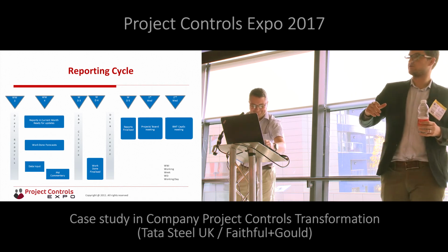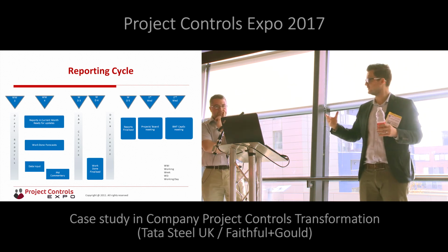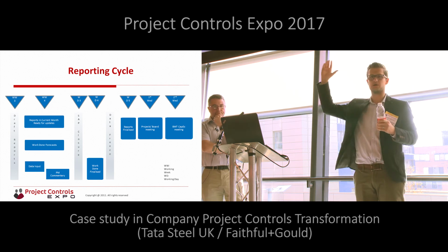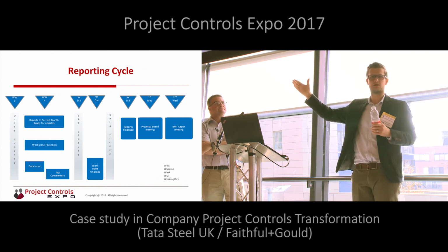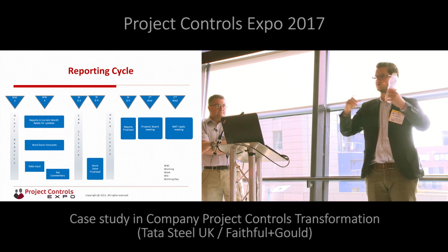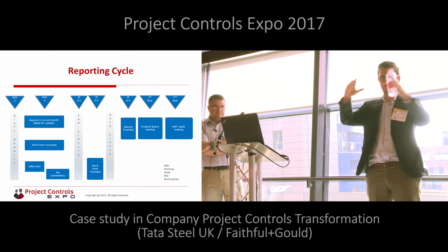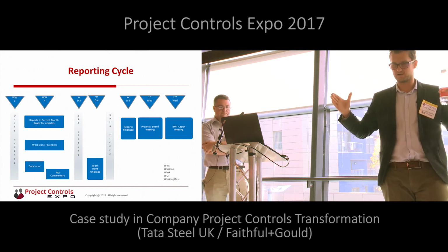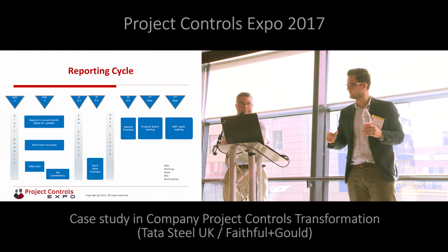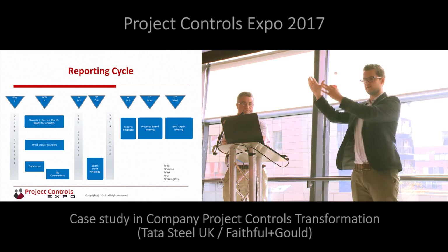Okay, so for me it was all about, if you look at the right-hand side of the screen, what do we want to report and when. We've got some key meetings within our monthly governance. We have a senior management meeting, second Wednesday of the month. Prior to that, we have a project board meeting where we bring all our project managers into one session across one day. We have a 20-30 minute update using a consistent project controls template format. They get 20-30 minutes, 40 minutes, whatever they require to update on their projects. We get that feel of the portfolio going into the second Wednesday.